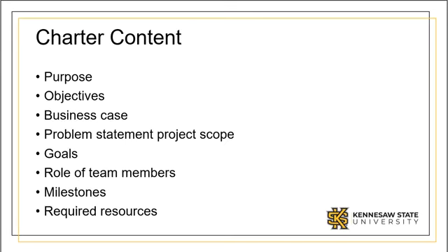The charter begins with a purpose statement. This is a brief statement explaining why the team is being formed. The purpose statement should align with and support the organization's vision and mission statements. Objectives should always be stated in measurable terms. The charter should also define the operating scope. The remaining elements of the charter will be explored on the next slides.